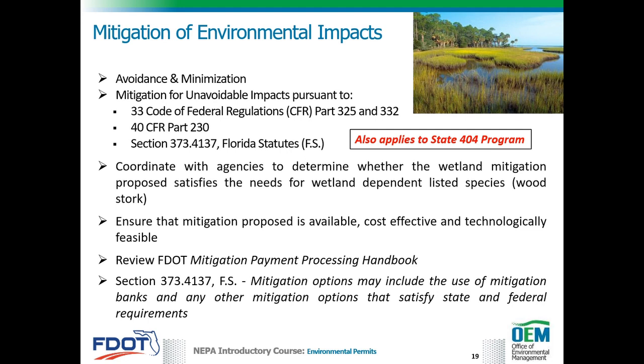Mitigation for unavoidable impacts is required pursuant to 33 Code of Federal Regulations, Parts 325 and 332, 40 CFR, Part 230, and Section 373.4137, Florida Statutes. This applies to permits issued under the State 404 program as well.